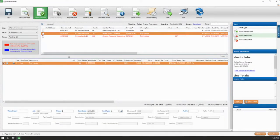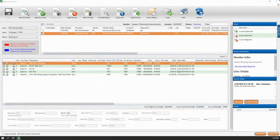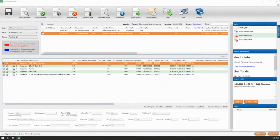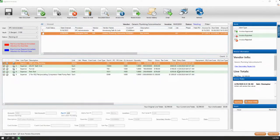Once the invoice is coded, we can approve that document and it will run checks on the document to see things like: did the document exceed the job budget? Does the vendor have all their compliance documents in order? These checks allow you to stop your reviewers at this point and say you can't approve it until this stuff is taken care of — or even just make it a warning to say, hey, by the way, this vendor's compliance is out of date, are you sure you want to move forward with approving this invoice? So you can check all of those things automatically with Paperless, which helps to speed up that process and make sure you're not paying people who shouldn't be paid yet.